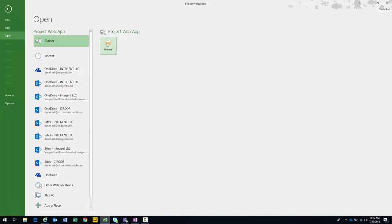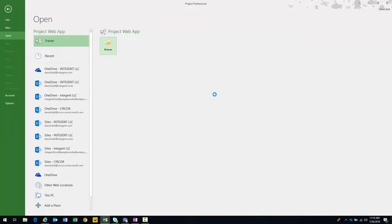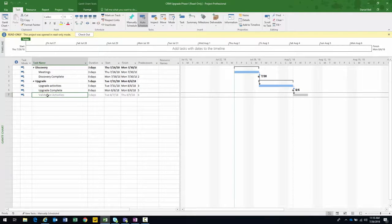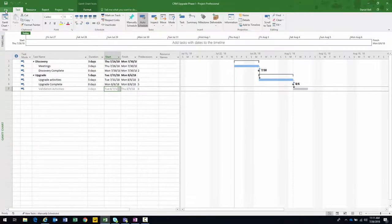Let me check in and open Phase One. There's the project — notice the successor reference appears slightly grayed out, showing it's starting on August 7, which is when the predecessor finishes. Phase One ends August 6, then Phase Two starts the very next day. This is also represented in the Gantt chart. I'll go ahead and publish — you can see it saving and publishing in the bottom right.